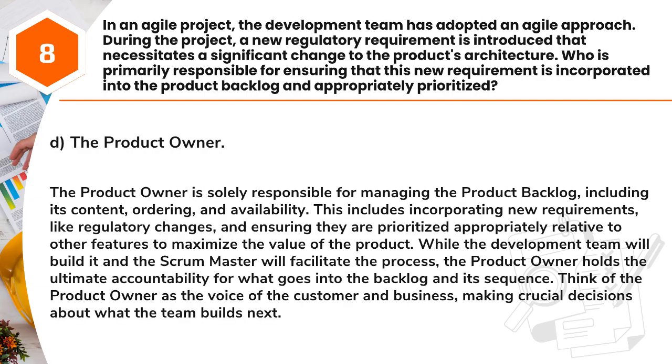Answer: D. The product owner. The product owner is solely responsible for managing the product backlog, including its content, ordering, and availability. This includes incorporating new requirements, like regulatory changes, and ensuring they are prioritized appropriately relative to other features to maximize the value of the product.